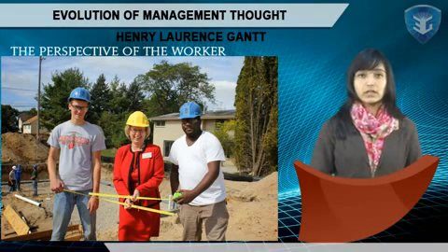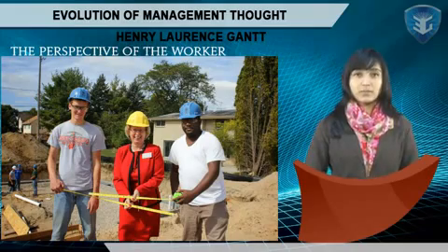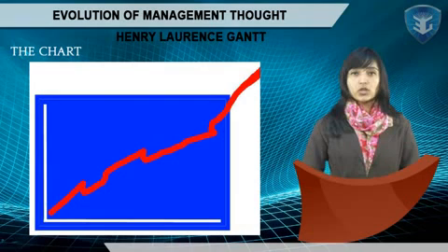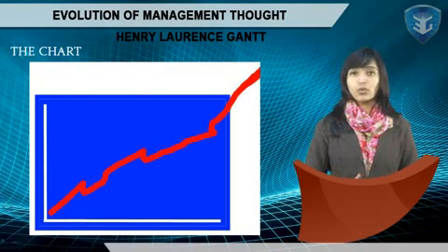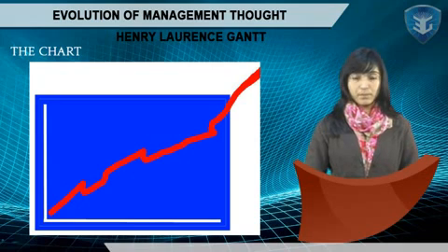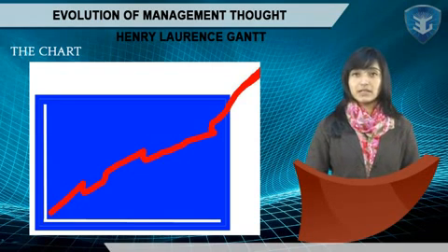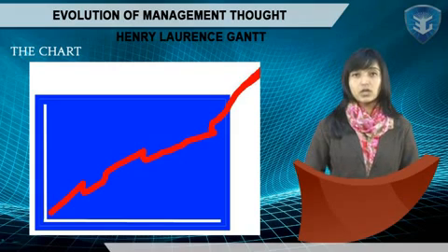But here Gantt brought in an innovation by paying the foreman a bonus if all the workers met the required standard. The chart. Gantt's bar chart started as a humble but effective mechanism for recording the progress of workers towards the task standard. A daily record was kept for each worker in black if he met the standard, in red if he did not. This expanded into further charts on quantity of work per machine, quantity of work per worker, cost control and other subjects.